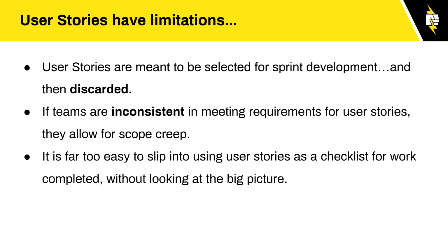The biggest problem I've seen, though, is that it's far too easy to slip into using user stories as a checklist. This piece is done. This piece is done, move it over. This piece is done, move it over. And then in the end, you have this project that was built of all these different pieces, but none of them actually work together. There's no communication across those pieces.